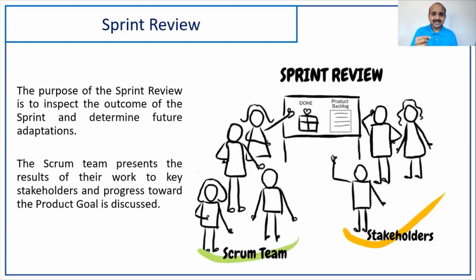And third thing, whatever deviations we want to talk about on different stories, are we representing the team consensus? Because it's not like you go and outright talk there, because the stakeholders will perceive it about the entire team. So these are the deviations, and because of these impediments, we are not able to achieve the sprint goal. And how do we present it? What kind of support do we need so that this kind of deviation won't occur? That kind of preparatory session we have to do, number one.